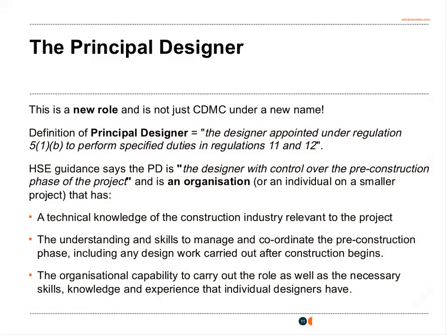The key to look at when thinking about whether a principal designer needs to be appointed is looking at what the principal designer needs to be able to do under the 2015 regulations. Those regulations indicate that a principal designer needs to be appointed as soon as possible before design work starts, and point 1, they need to be a designer. Point 2, they need to have overall control for pre-construction work so far as safety concerns.